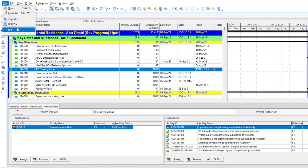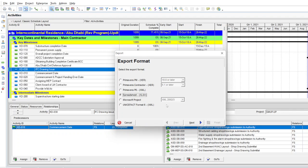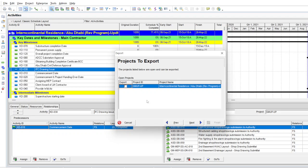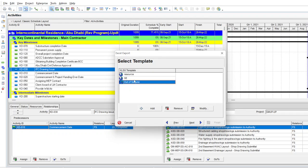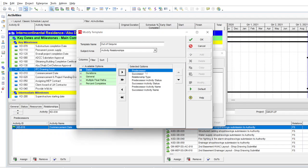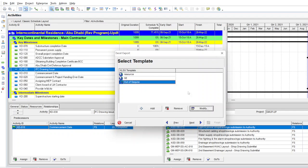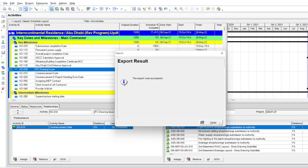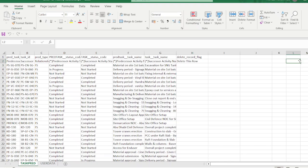If we needed to remove 697 activities manually one by one that would be very slow, but Excel helps us remove them very easily and fast. So remember we have around 697 out-of-sequence activities. Go to File, Export, select the Spreadsheet option, press Next, then select Relationships only — no need for other options. Select Next, then select the program you are working on, and press Next.